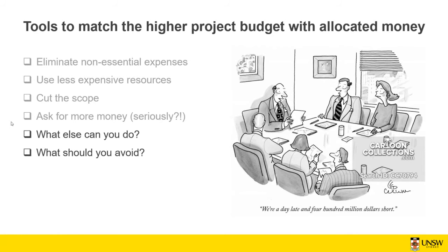Anything related to safety, yes, we need to avoid anything that is going to compromise safety with high risk. This is another thing that we need to avoid. And also avoiding rework, that's right. Anything that perhaps saves budget now, but later we need to redo the job again, at the end is going to increase the budget, which is something that we should avoid.